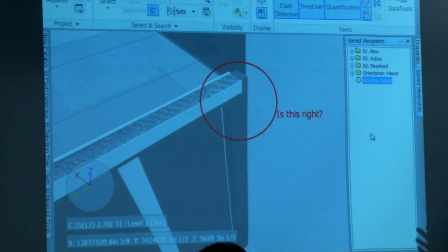Because most of the time in building an estimate is doing the quantification side, not so much the pricing side. And so you can spend 2/3 or 3/4 of your time just counting everything up, measuring it all, and building your database of quantities. And then you're just plugging unit prices in. It's, you know, quantity times unit price equals cost. The pricing can be simple, maybe. Because you could have a database of prices that you work with all the time, and you're just keeping those current with inflation and everything.